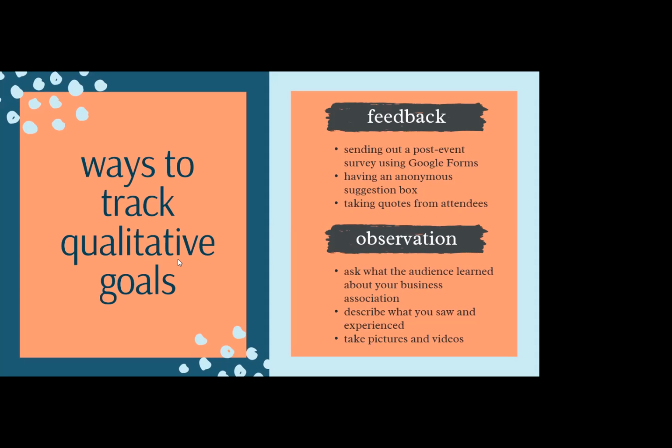With the survey piece, there's always a hesitation to do a post-event survey via email. It doesn't necessarily generate a lot of feedback at times. So that's why it's great to either have the survey be on the way out, or something where there's an incentive to fill out the survey.